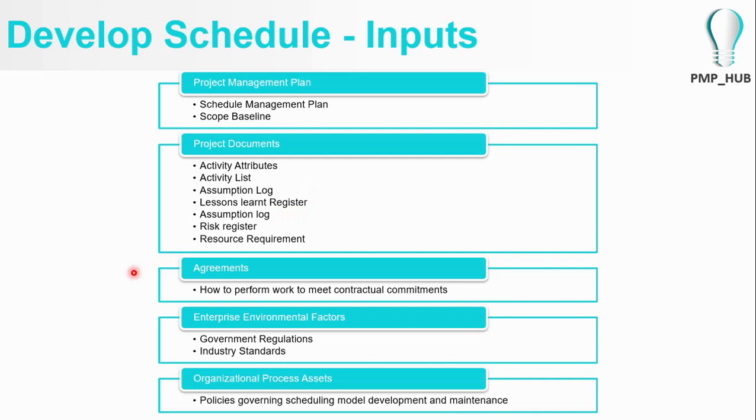Also, if you are handling a project for a customer, any agreements with the customer on contractual commitments will be an input to develop the schedule, because it will give you the start time and the end commitment times or any other milestones that we have agreed with the customer.